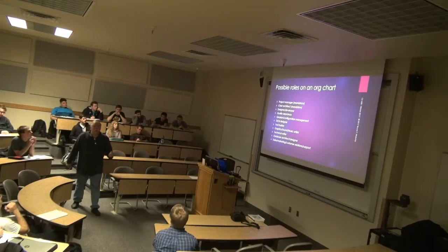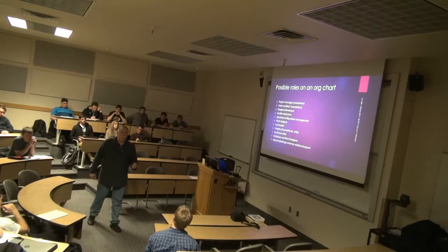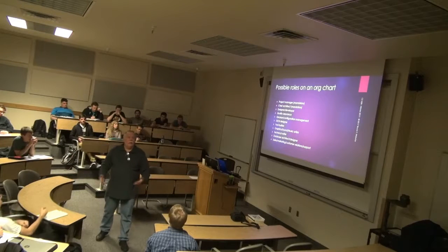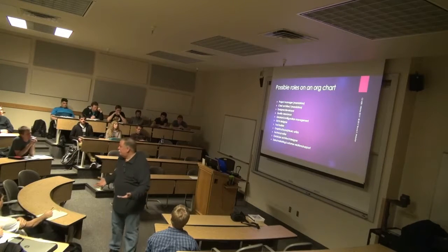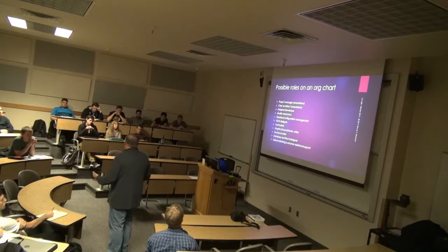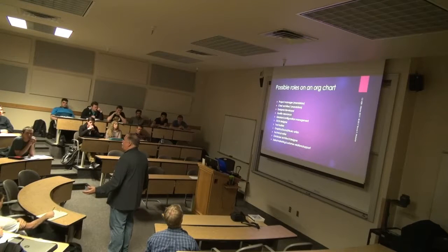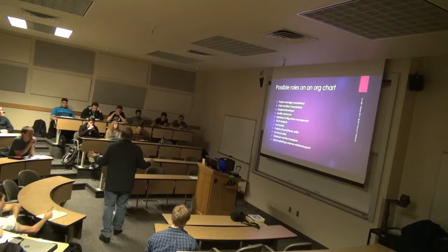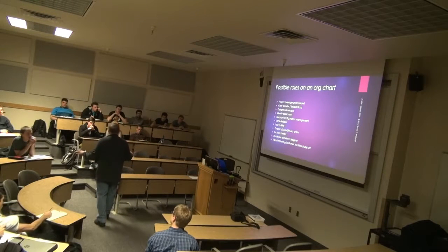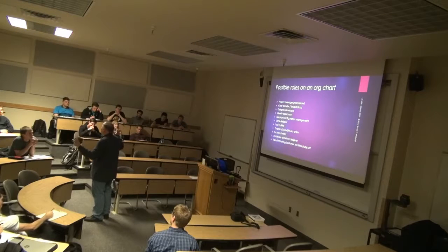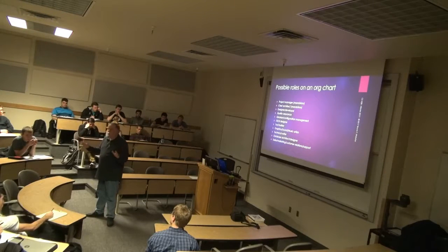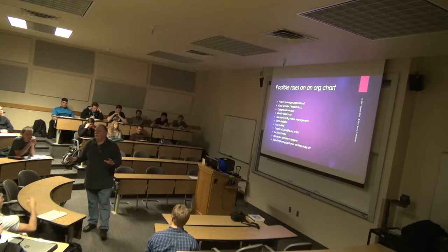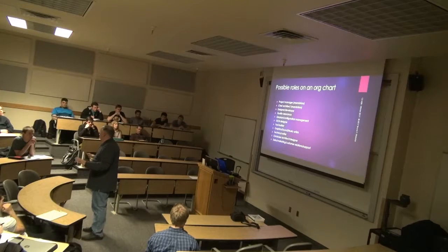When I'm asked to go in to review troubled projects, either as a consultant or when I have done it as an expert witness, one of the questions I ask is, who's the chief architect? And what I usually find, if it's a troubled project, is no one can answer that, or I get a bunch of different answers, which in some ways is even more scary. My very first consulting job at Ericsson on the Motorola Iridium network management subsystem, that was the question I asked, who's the chief architect? And I literally got half a dozen different answers.